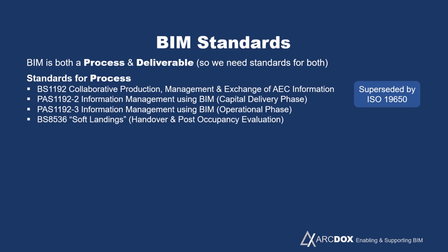The last one there is also really fascinating, BS 8536, which is a standard for what's called soft landings. It's really a process of incorporating someone in the design process that is considering the operations and performance of the building beyond the capital delivery phase, and also keeping the delivery team involved for 3 years after handover to carry out post-occupancy evaluations.